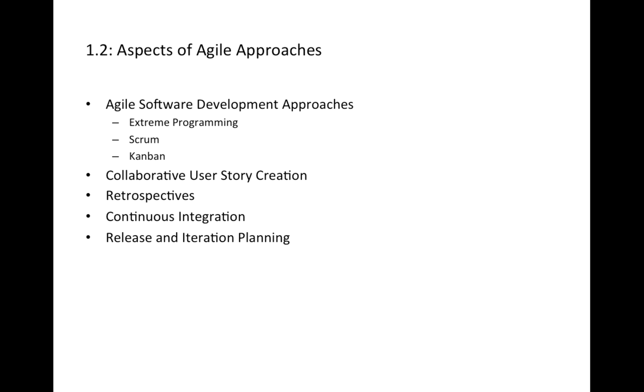They can be involved in creating acceptance tests for the user stories, breaking down user stories into tasks, estimating testing effort for all the testing tasks, identifying functional and non-functional aspects of the system to be tested, and supporting and participating in test automation at multiple levels of testing. It could be mobile testing, browser testing, or different testing tools, and so on. So testers can be involved in iteration planning and in the release plan.